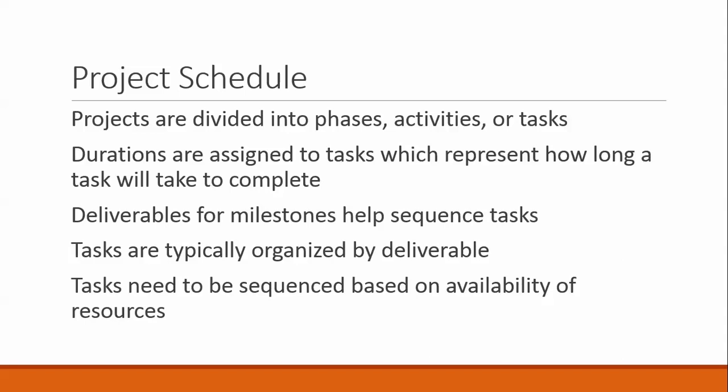that are involved in website development. Some of the tasks at a very simplistic level may include gathering requirements, then designing the website, then gathering data, then building the website, validating and testing the website, and then the implementation or rollout. Well, we certainly can't implement or roll out or even test a database that hasn't been built. We don't want to build a database until we've gathered requirements and done a design. So there's a natural sequence involved in the tasks of building this database.